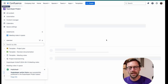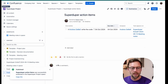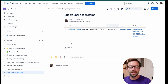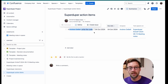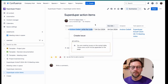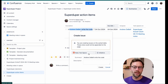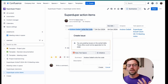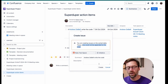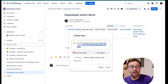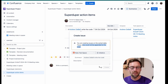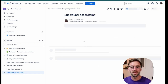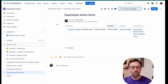You might say: can I turn a task or action item into a Jira ticket? The answer is not really directly, but if I select text in Confluence — in an action item, a decision, or anywhere else — I can click 'create issue.' This will let me quickly create a brand new Jira issue. As a project manager, sometimes I don't have time to go make a new Jira ticket and fill out every field. So I just slam in an action item, and later I come back and convert some of those to Jira tickets to help speed up the team's process.